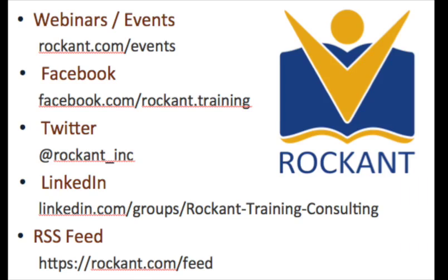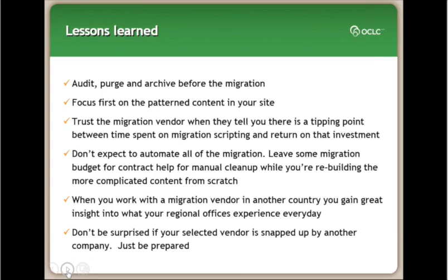So, lessons learned. Be sure you do a full audit, purge, and archive before the migration so that you're not moving over content that you really don't need. And trust the migration vendor when they tell you there is a tipping point between the time you spend on migration scripting and a return on that investment.